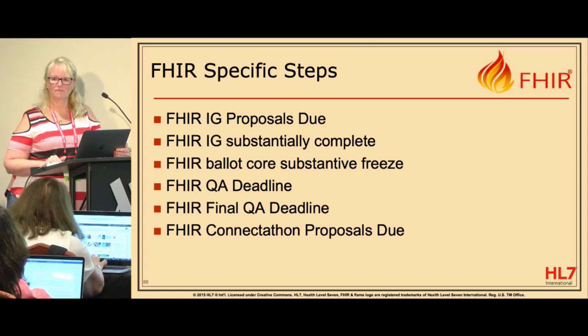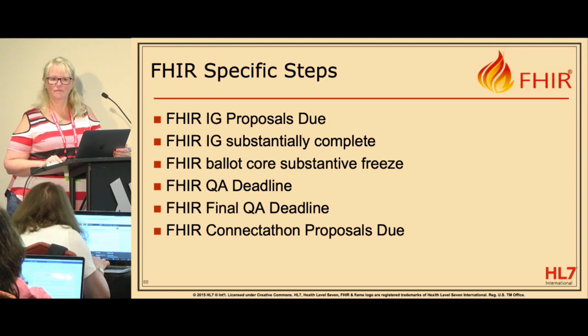And then Graham typically has to run around like a mad person trying to fix said tools so that you can actually publish. And he's tired of that. So the expectation is if you're going to do anything new and cool and interesting, it has to be done prior to that substantive freeze deadline, so that if there's going to be tooling issues, we have sufficient lead time to have a hope of actually fixing them.